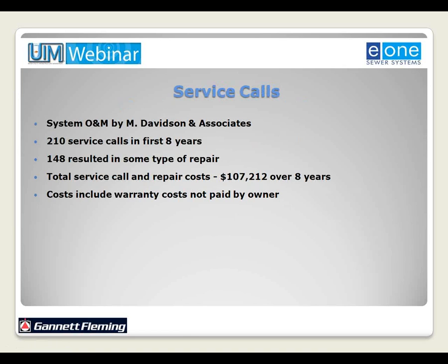Historic service calls. Again, the system operation and maintenance is by M. Davidson and Associates of Jamestown, Pennsylvania. They're about 20 to 30 miles away from Lake Latonka, their corporate offices. In the first 8 years, there were 210 service calls, 148 of which resulted in some type of repair. The total service call and repair costs were approximately $107,000 over the eight-year period.